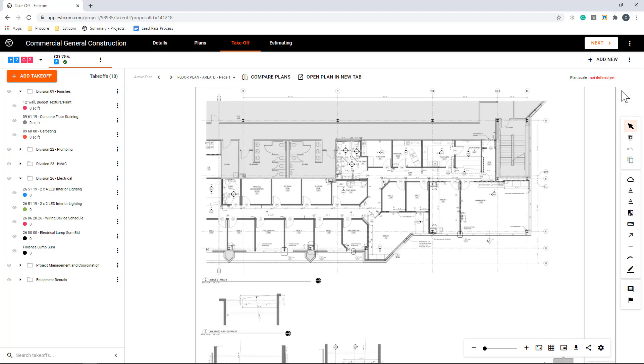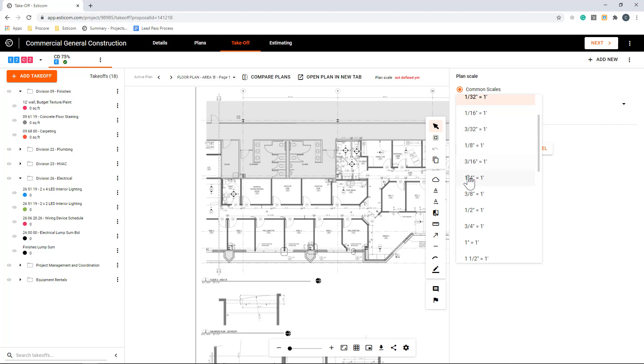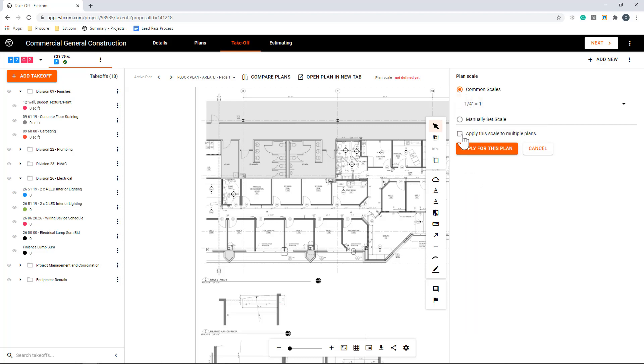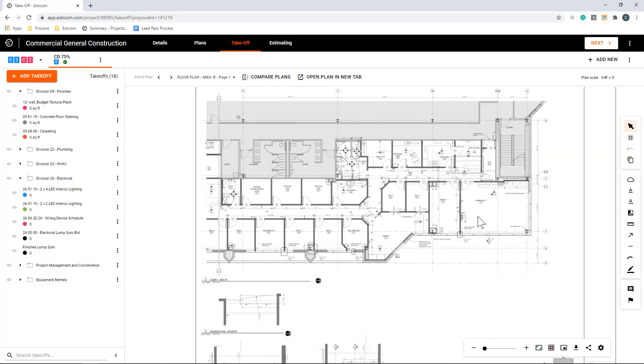We'll first want to set a plan scale. You can do that here, and we'll use a standard one-quarter inch equals a foot from our list of common architectural and civil scales. Now that our scale is set, let's start a takeoff by selecting one of the pre-built parts and assemblies.